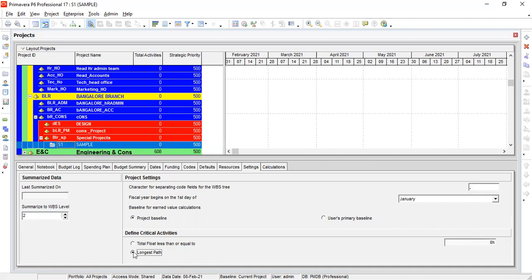My point is, see, critical path is the one where the float is zero. Activities where float is zero is a critical path. Yes, sir. Not that, sir. Less than or equal to how many hours you have to set. That is total float permissible. Suppose after adding, now the project is over, sir. Tomorrow I will add some activities to the project. Based on our activities, you have to set some permissible delay in real time. It will calculate it. We have to give some 50 hours.